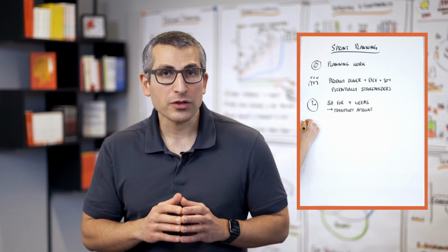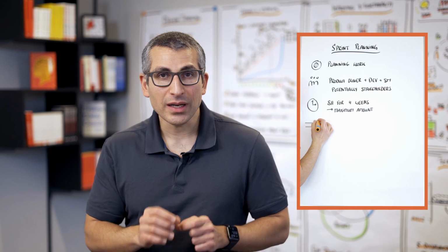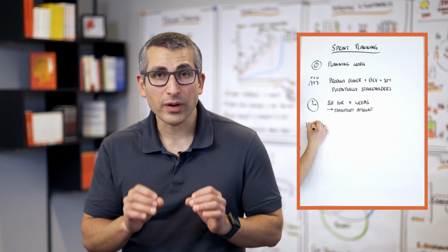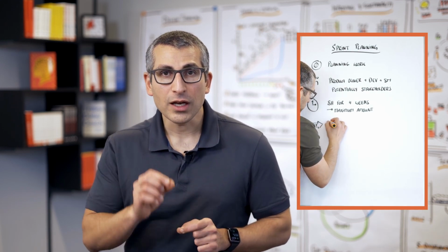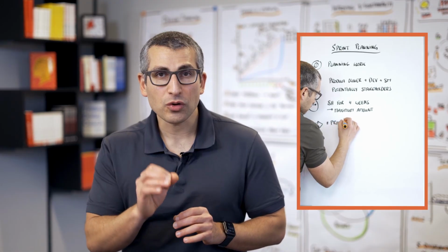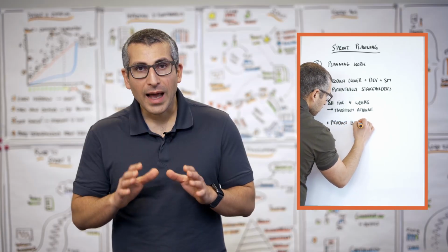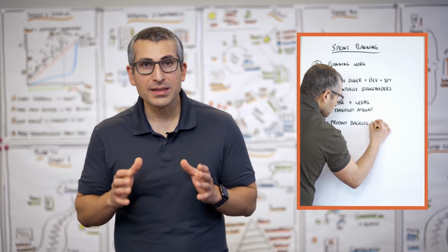How do we prepare for the sprint planning meeting? Actually, the best way is to have a great product backlog refinement, which results in a ready product backlog. Now we can move into the sprint planning itself.